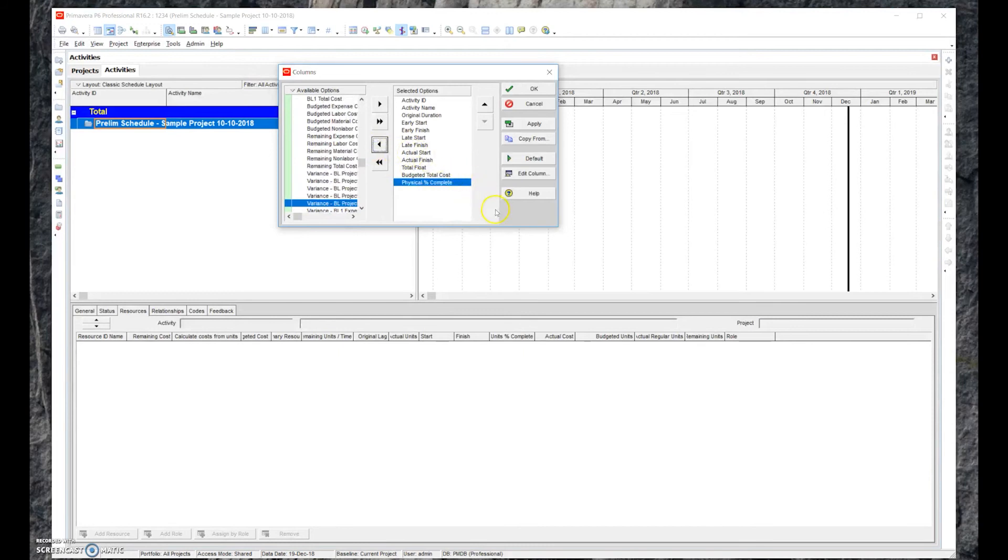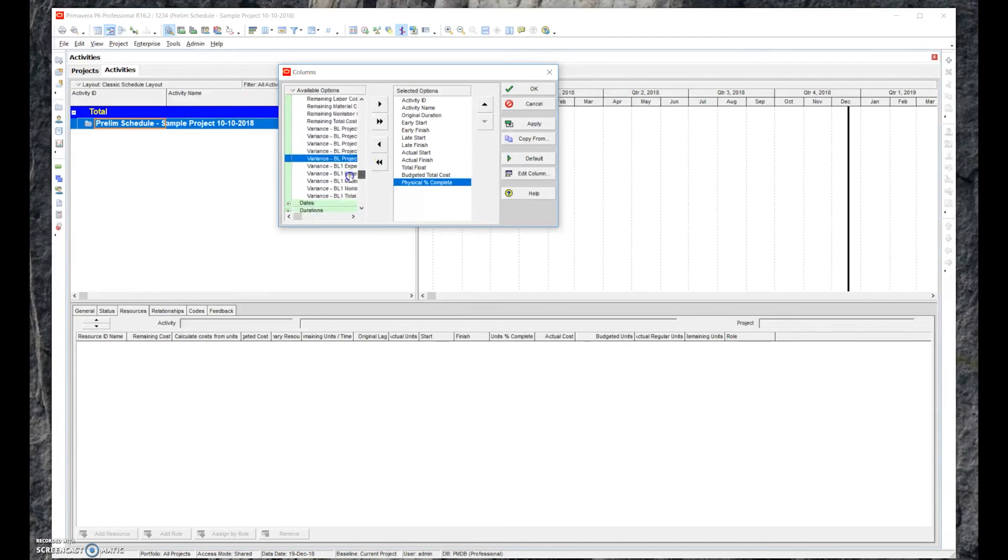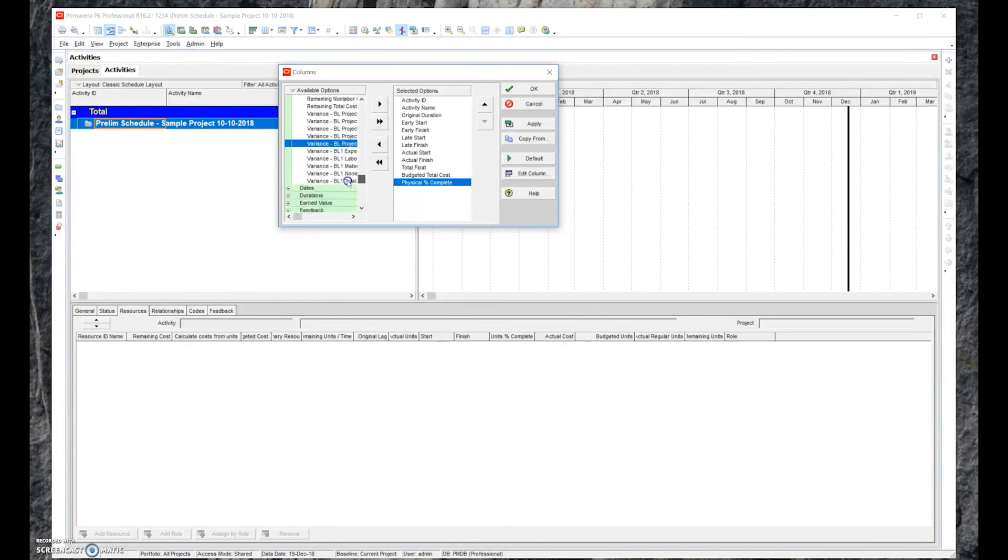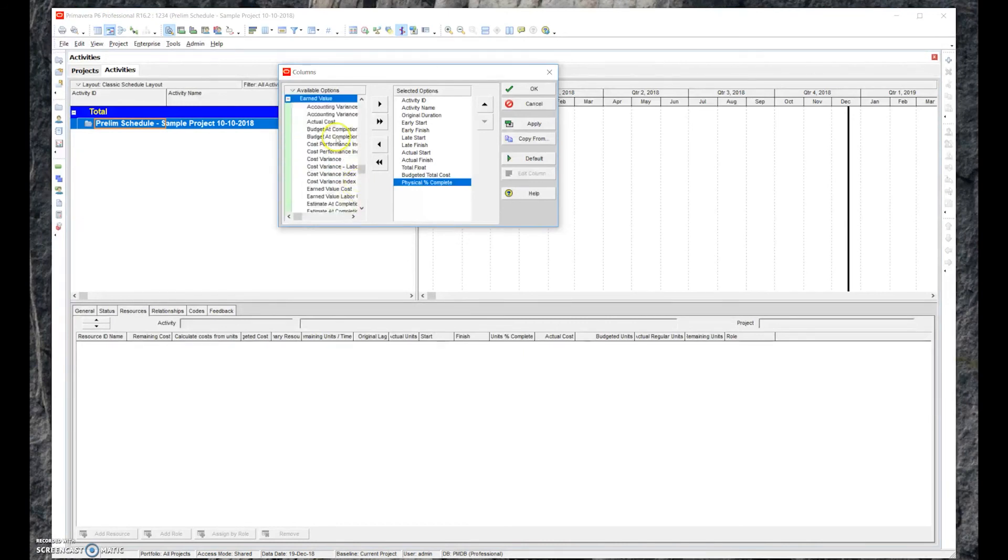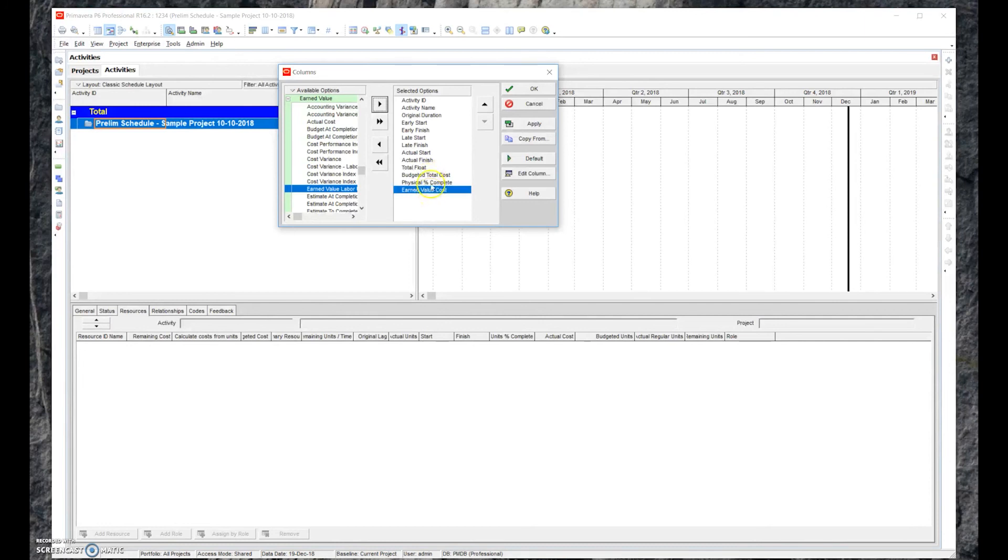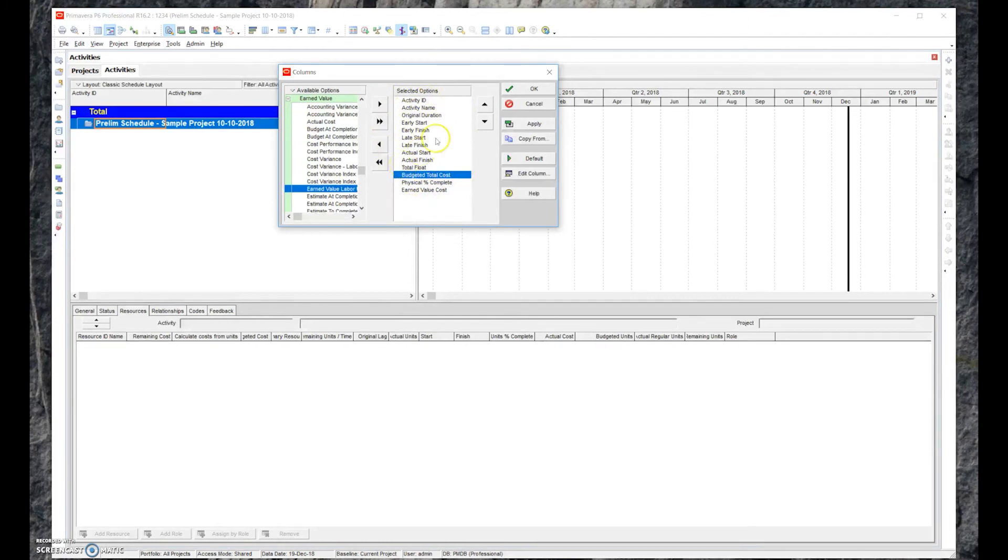Last but not least, we want the earned value cost. We'll go in here to cost. We want to look for earned value cost. What is earned value cost? Earned value cost is simply you take the budget units, say if it's $1,000 times 100%, the earned value cost would be $1,000. Now if this was 90%, so $1,000 times 90%, it would be $900. So it automatically calculates. Now these are the columns that are important that we want to see and are fairly standard. So we go ahead and hit OK.